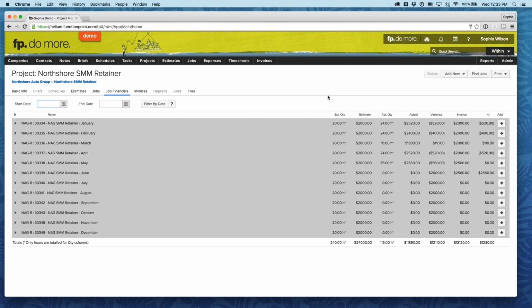A really simple way to do that is probably exactly what you're describing, where you just have this overage job and you just look at the other jobs, see what the overages were, and then just type in the invoice amount. If you want to be really advanced with it, you could move the timesheets that were the overages from one job to the overages job, and then actually bill those timesheets.